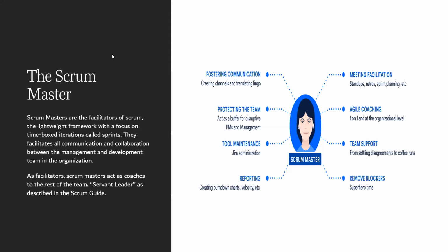In an unhealthy environment, a product owner might quickly say, okay, these are the story points, or these are the user stories that we are committing to. It might be more than what the team can deliver. If the Scrum Master is not available, then the voice for the Scrum team to say, oh, we cannot deliver this, is missing. So the Scrum Master is there to protect them and ensure that they only commit to what they see to be feasible, to what they can deliver.